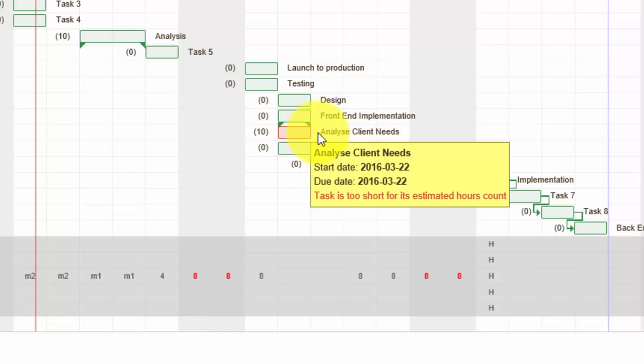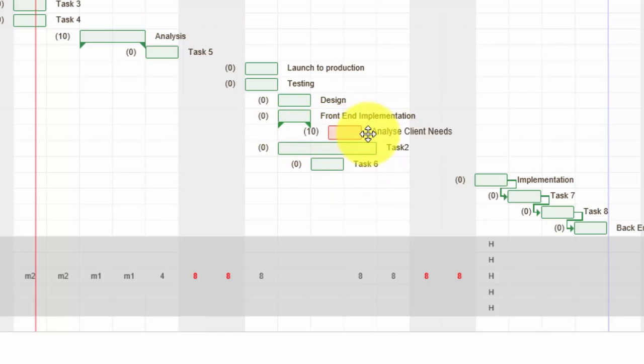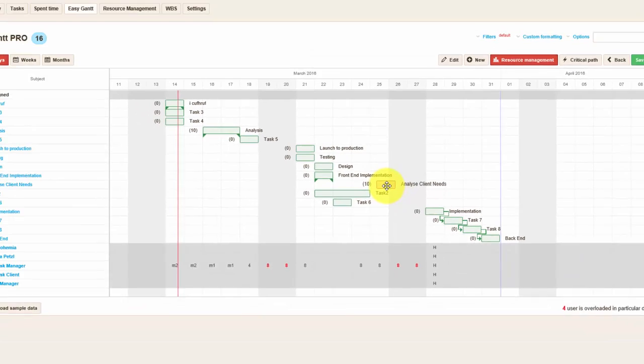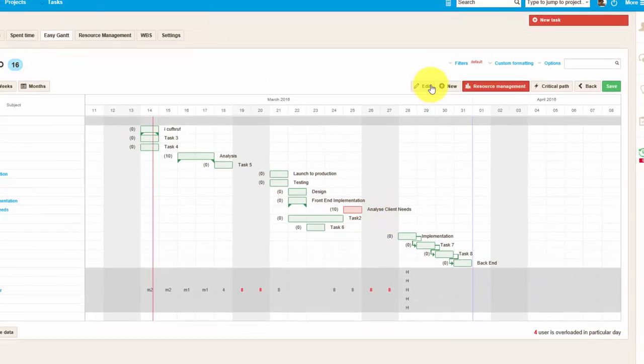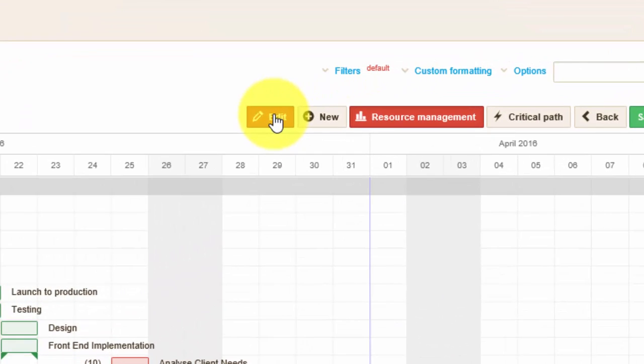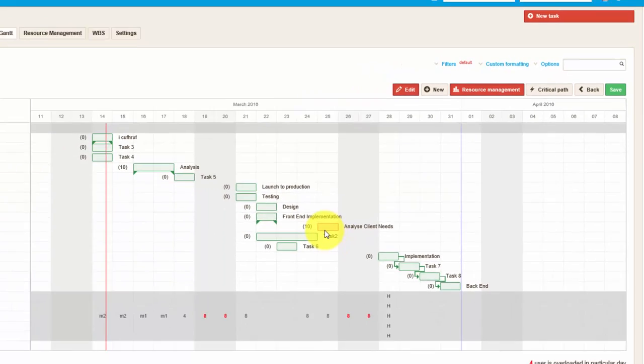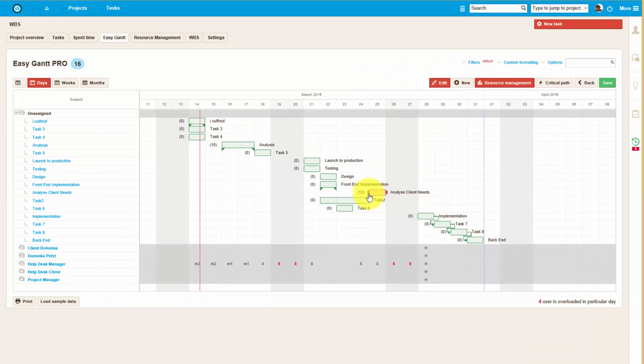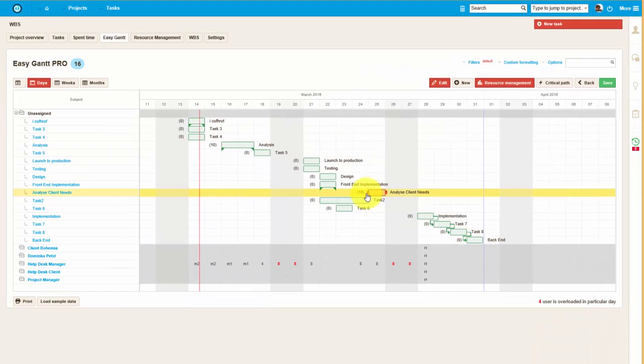As in Gantt chart, here you can change the timing of the task using drag and drop, and in addition to that, if you click on edit button, you can adjust the task's duration.